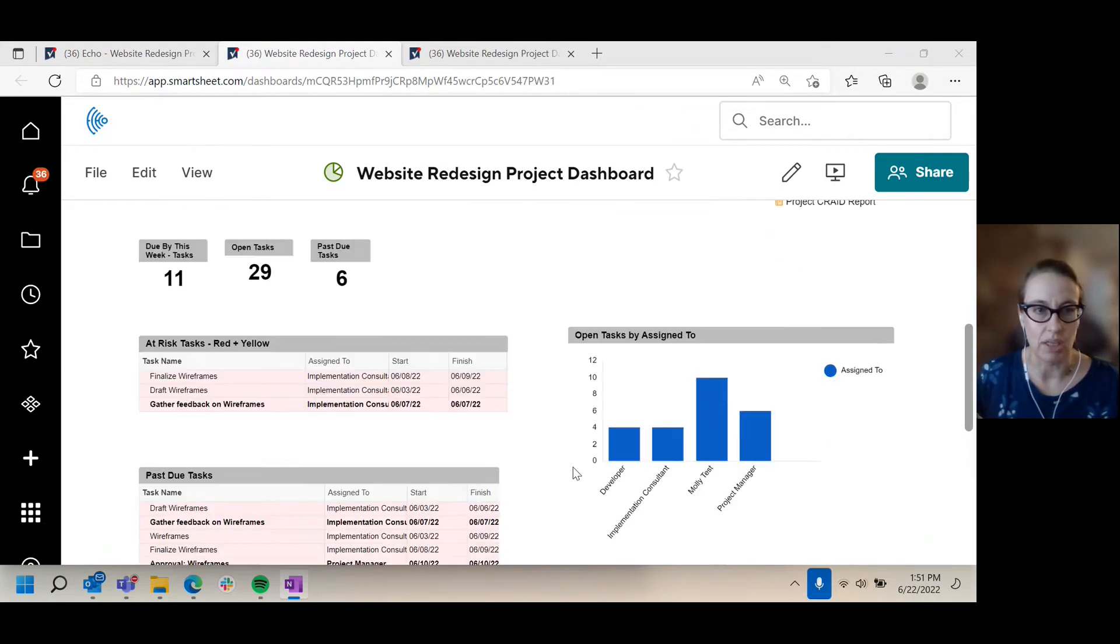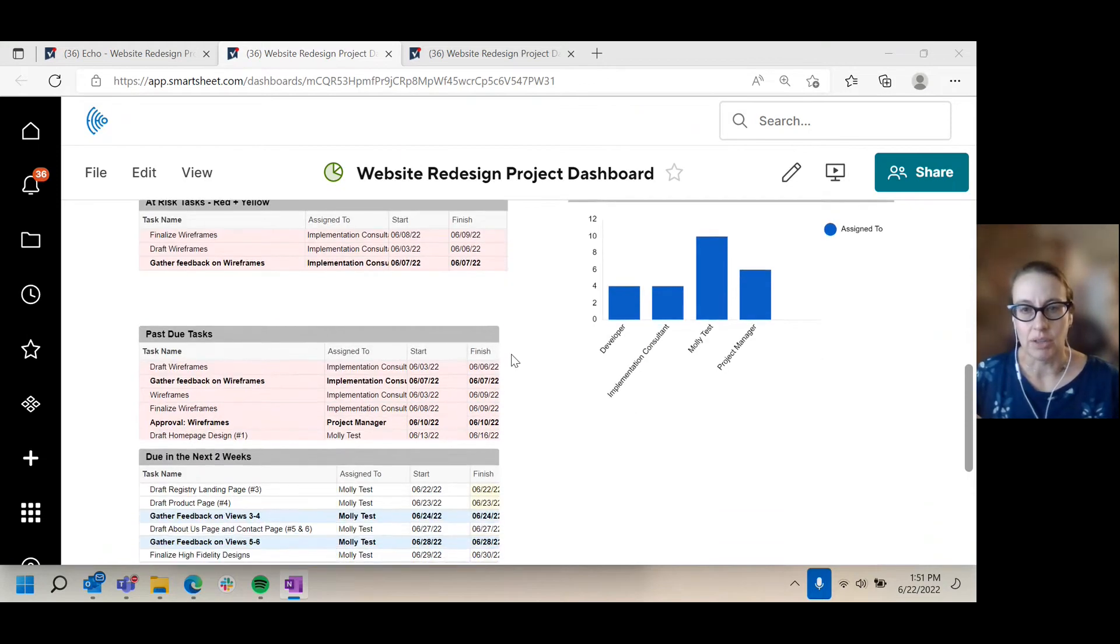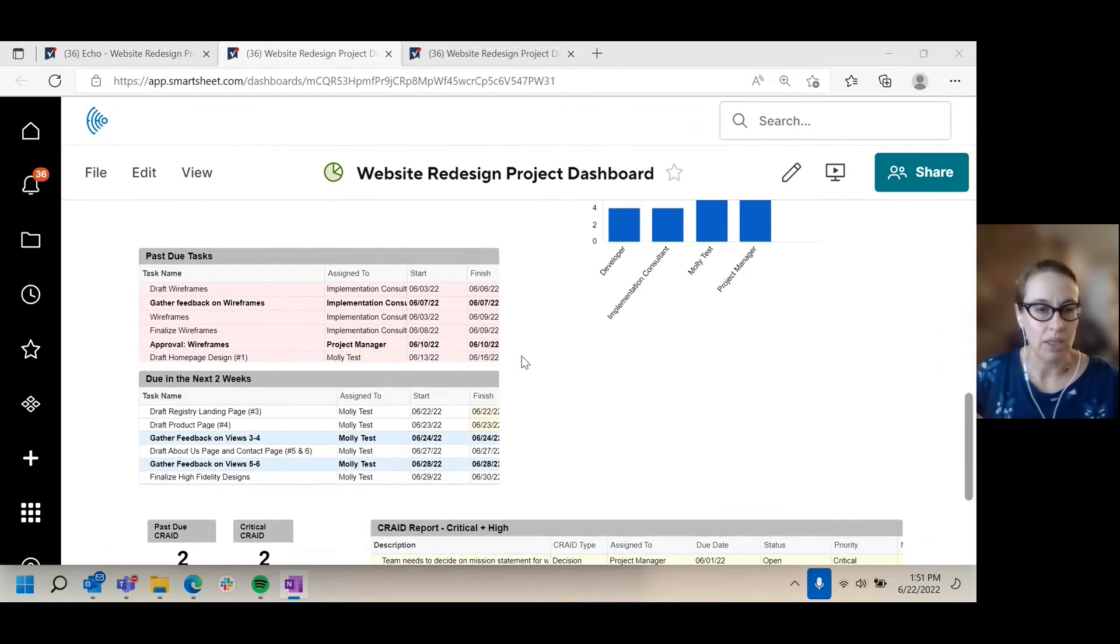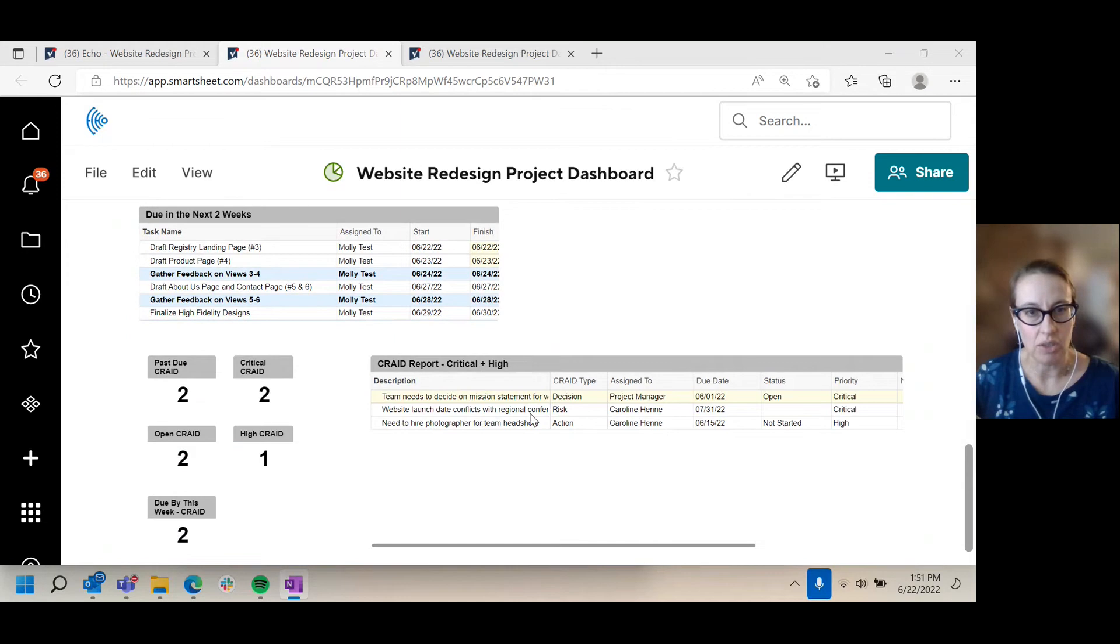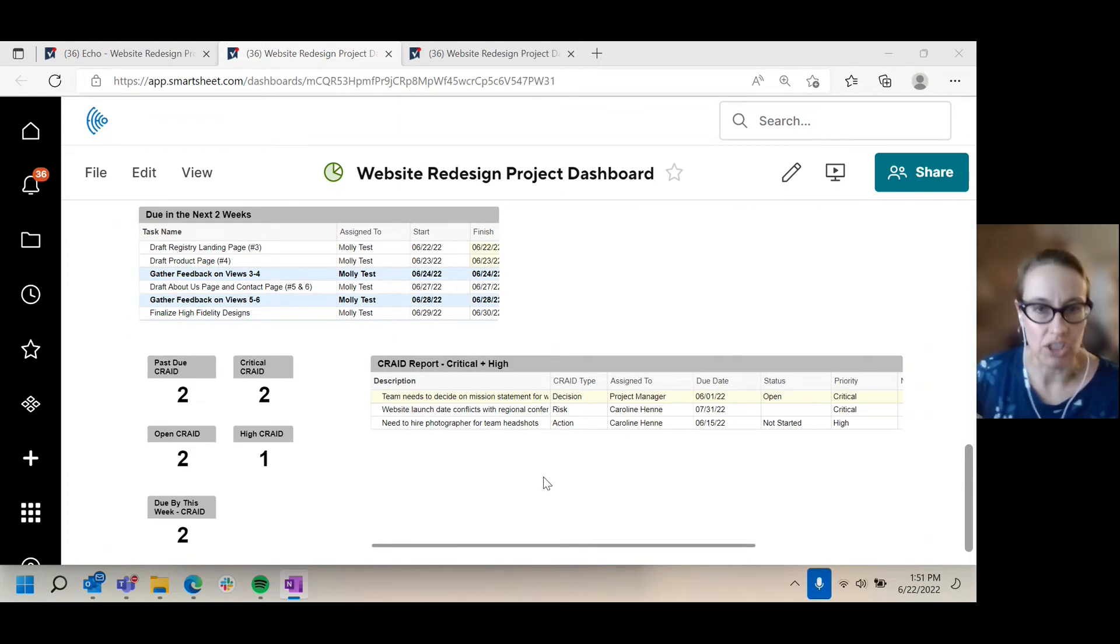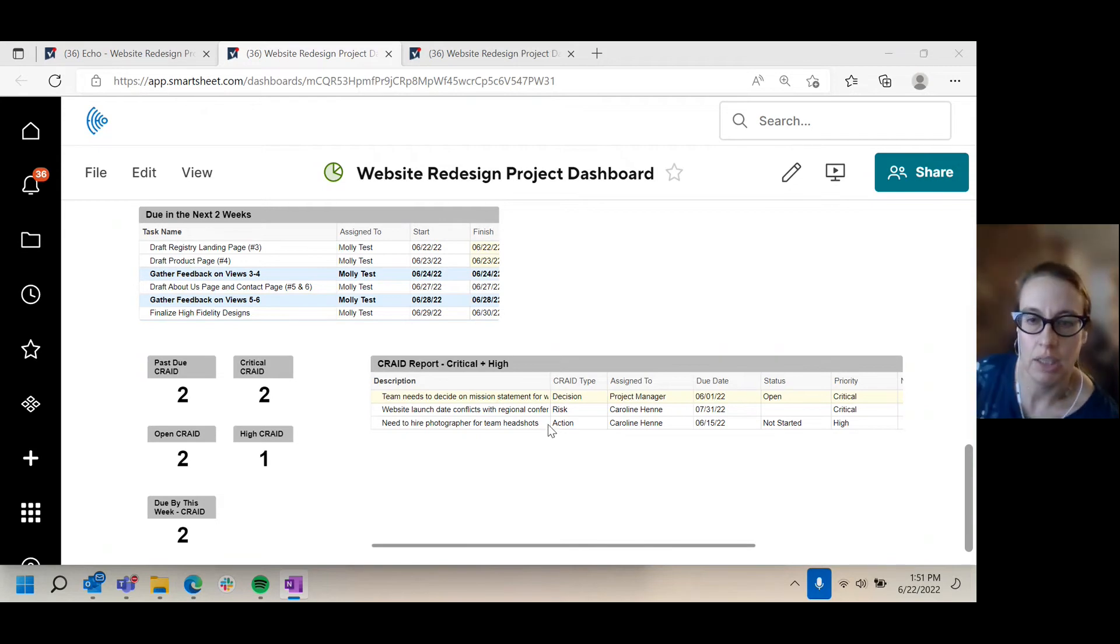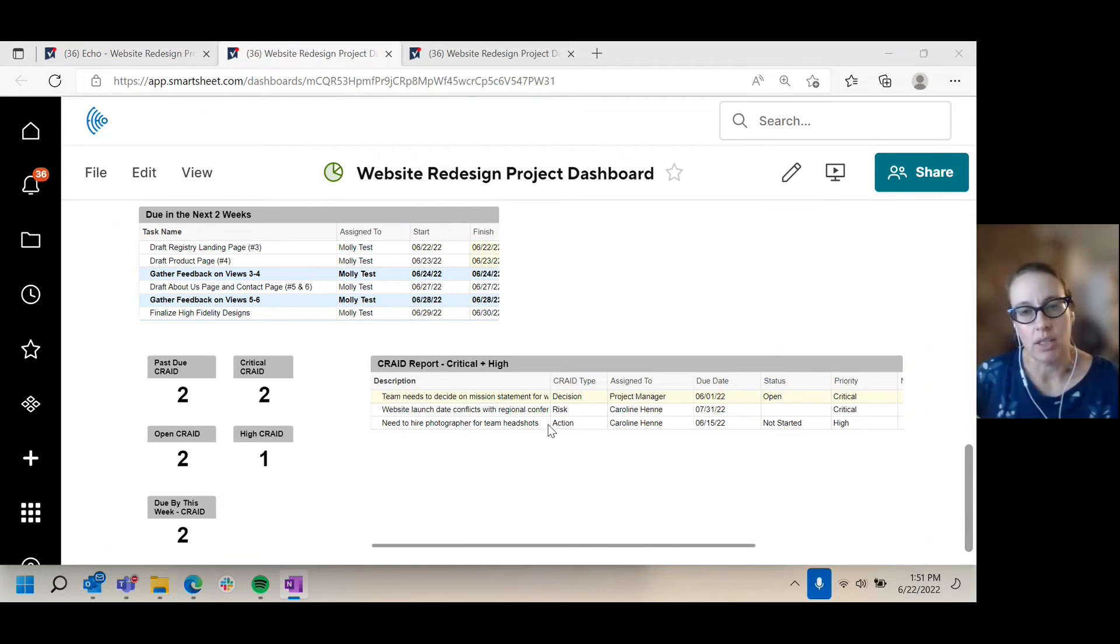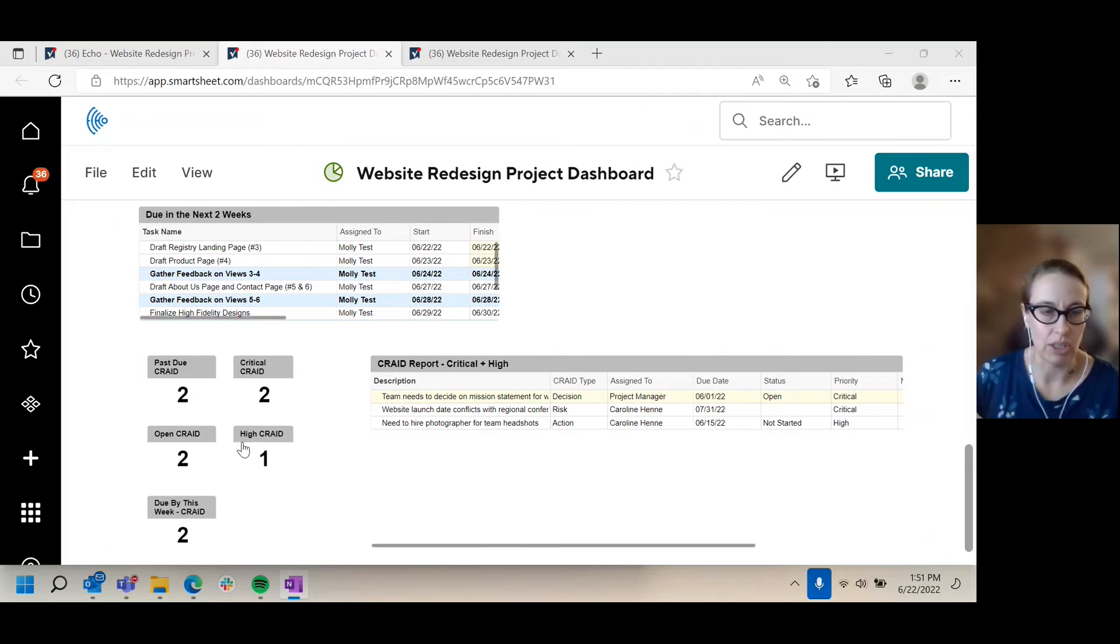You scroll down looking at different metrics about the tasks for that project. And this is something at Echo we call a CRADE report. It's something that's used in project management to help track change requests, risks, action items, issues, and decisions, just to give you some context around that.